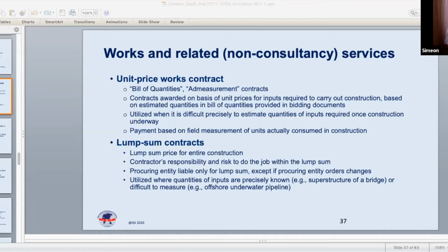For example, if there's an obligation of the prime contractor to devote a certain percentage of the work to subcontractors, those types of obligations, or if there's a commitment on the part of the contractor to give a certain percentage of the value of the contract to women-owned businesses, those types of sustainable procurement obligations should be memorialized in the contract.